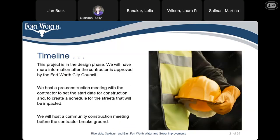The timeline: this is still in the design phase. We will have more information after the contractor is approved by the Fort Worth City Council. We host a pre-construction meeting with the contractor to set the start date and create a schedule for the streets that will be impacted. We will come back and host a community construction meeting before the contractor breaks ground.